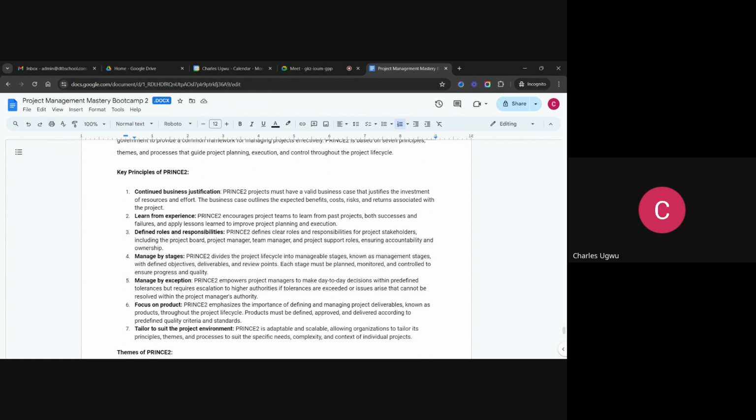So you must remove the cost from the benefit to get the net value. The net value must be positive before a project must continue. When the net value is negative, there is no justification in being in that project because that project does not bring any value. We call it feasibility studies.